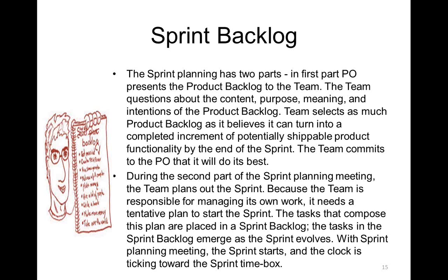Again, this estimation has to be done very fast. One of the techniques recommended for these kinds of estimations, whether for the product backlog commitment or for sprint planning, is planning poker. Typically, numbers from the Fibonacci series are taken and gross estimation is done. That estimation is defined by consensus of each of the team members, and then on that basis the team proceeds further.